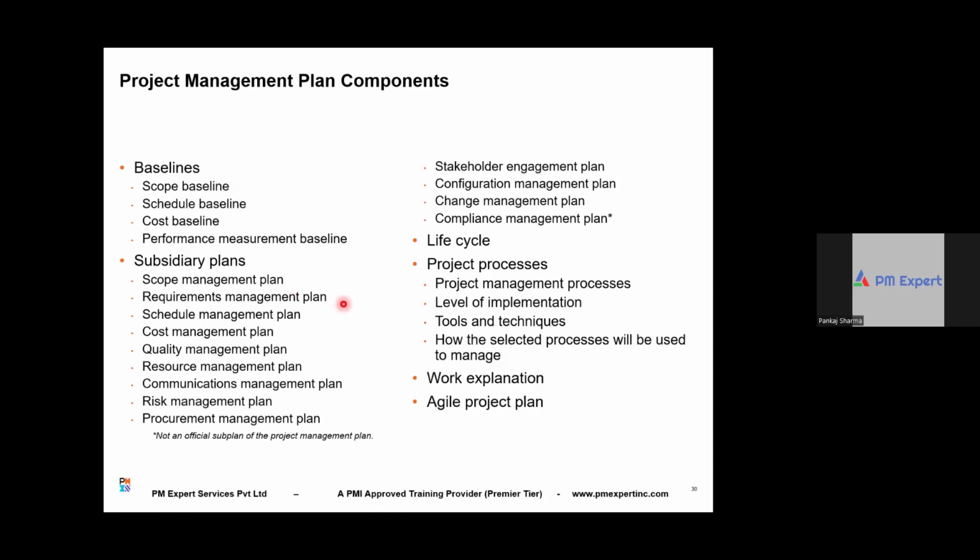Now, similarly, the requirements management plan is a document on how to manage requirements, right? Now, the schedule management plan is about how to manage the schedule. Tell me, will it contain any schedule? No. Where is the schedule? In the schedule baseline. It is only the process to manage the schedule. For example, will you be using Jira or a Gantt chart or Primavera to create your schedule? How will you track the schedule? What are your control thresholds?